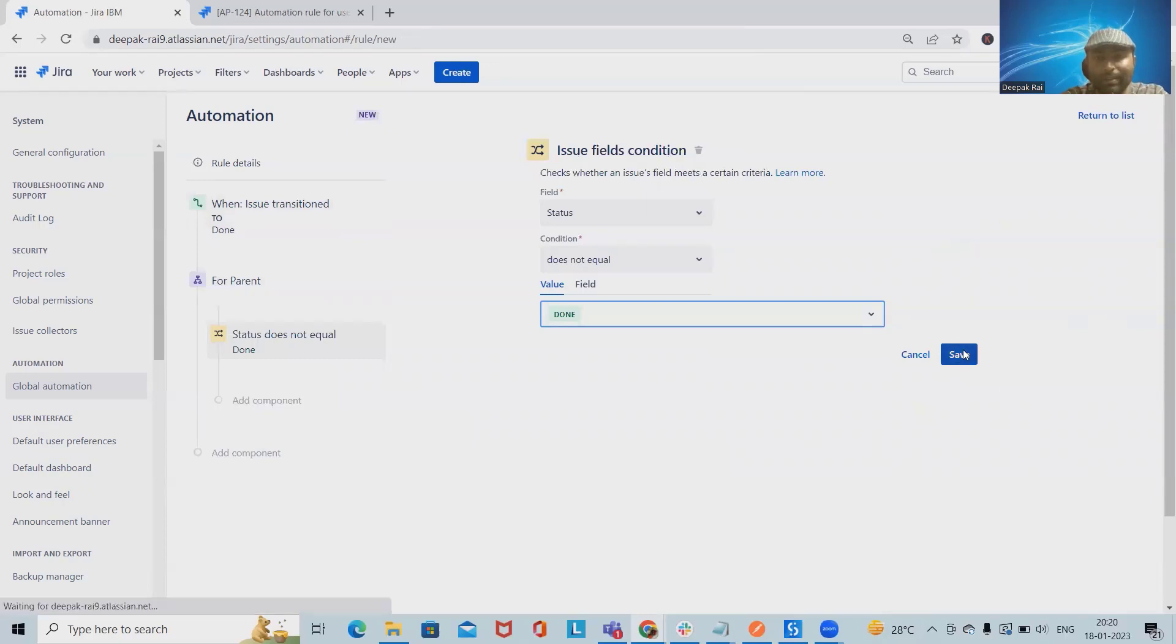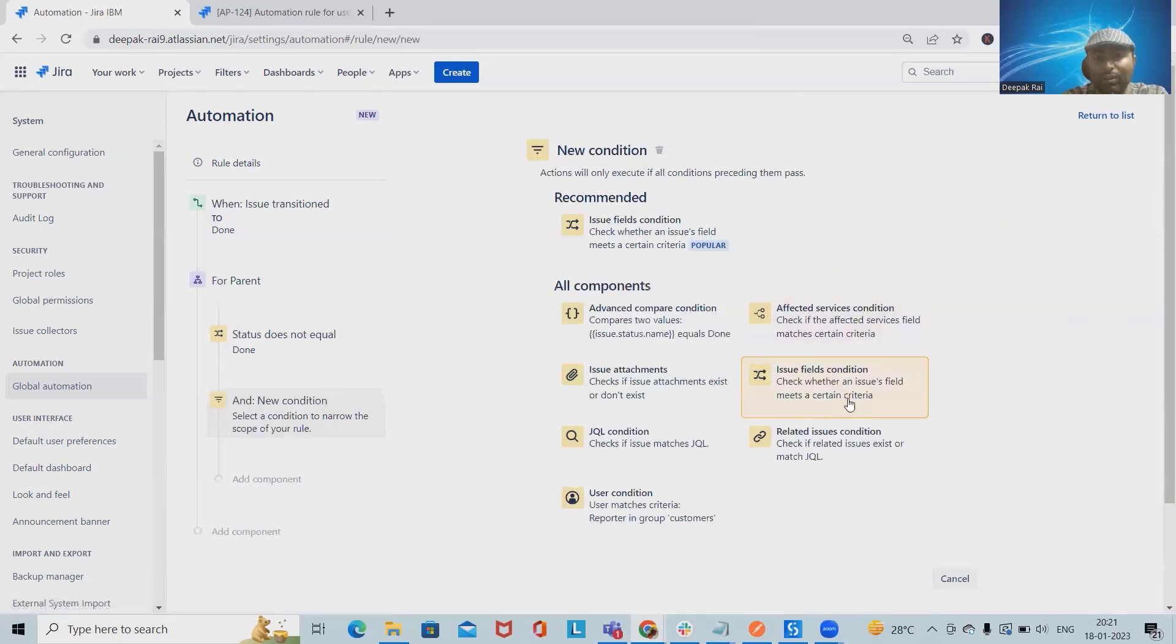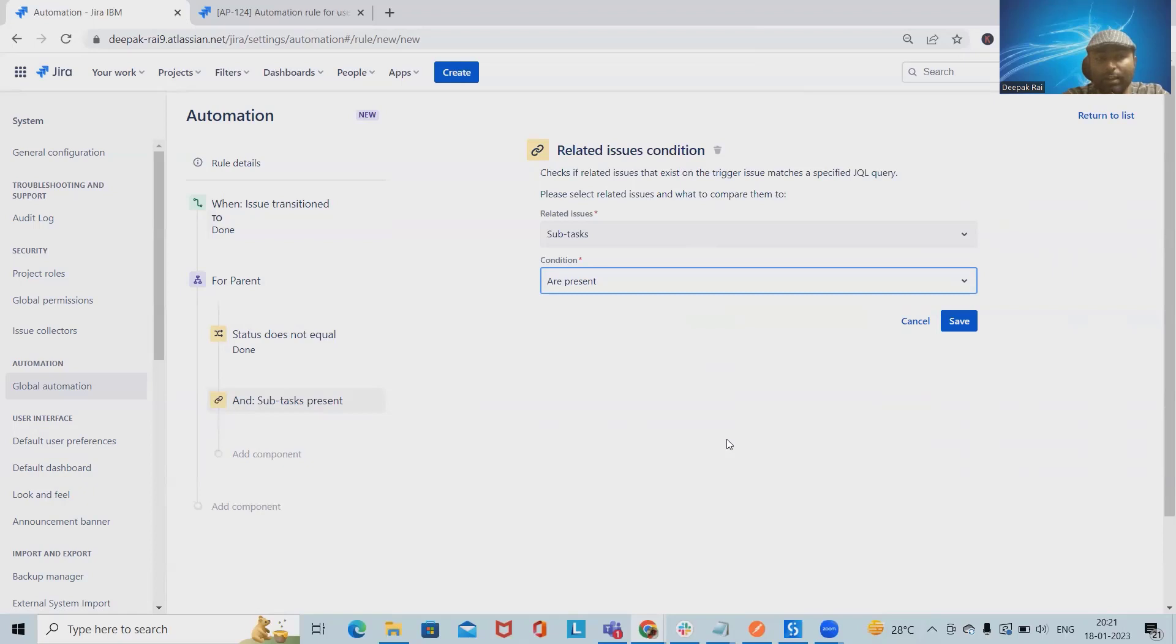After that I want to add one more condition. These additional conditions will be related issue conditions. When we are using parent and child relationship, we utilize related issue conditions. Inside the related issue conditions we always select subtasks because the related issue will be subtask.